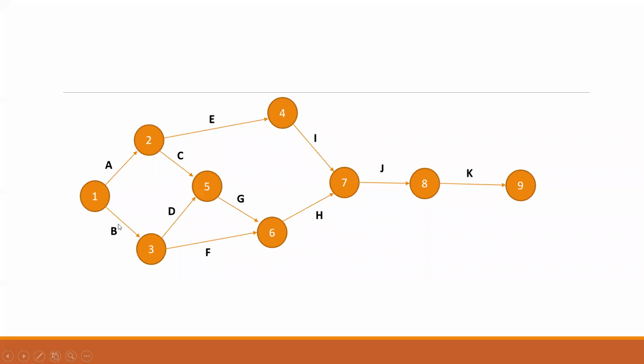So there are 2 arrows which are coming out of this node. So this one and this. So once we hide these 2, there are this node and this node which do not have any arrows coming in. And because there is a tie between these 2 nodes, both do not have any arrows coming in, I can give the topmost node as number 2. Or you can also think about giving it, because we have alphabetical order, E is first. So I give this 2. 2 and 3 will be given.